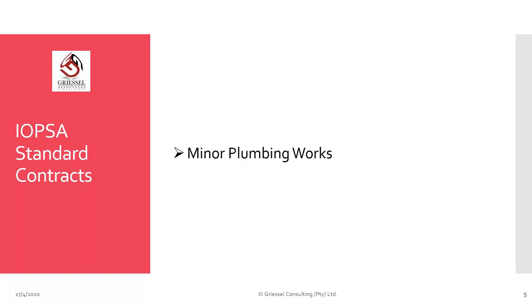defects in materials. The client must supply all water and electricity as well as toilet facilities, and when there are no toilet facilities available, the client must carry the cost of temporary facilities. If there are any plans to be approved, that is for the client to do. If there are any requirements of the local authority, also that falls on the client. And in cases where there must be soil testing or blasting, that cost and responsibility also lies on the client.